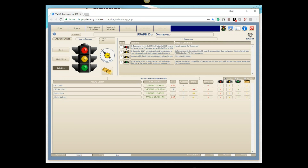Now I can drill down to see how each of my people is doing. For everyone assigned as an activity leader — like Diane — this column shows the last time that person updated their information. Green means less than 30 days, yellow means 30 to 60 days, red means over 60 days. There's also a roll-up of FTE numbers for employee utilization. For example, Diane is running at 1.25 FTE — doing the work of one and a quarter people. Long term that's not good; people get burned out and leave, so we want to work to balance them down to around 1.0.